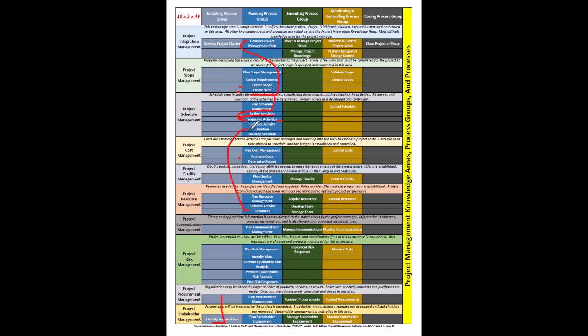I might do some what-if analysis when I'm estimating activity durations. What-if analysis would include, for example, what if I use 2 paint crews instead of 1? What if I use 2 carpenter crews instead of 1? Or 4 database programmers instead of 3? Or if I use 1 database programmer rather than 2. In our projects, we need to understand what our constraints are. Are we a cost-constrained project, or are we a schedule-constrained project?